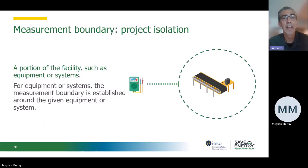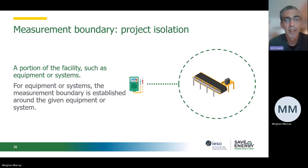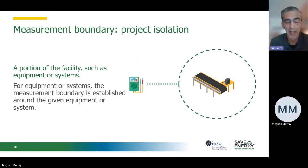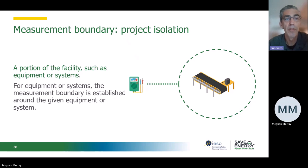Retrofit isolation is the other common measurement boundary, where you draw a boundary around the project itself. For example, those ventilation fans mentioned earlier — the measurement boundary was around the fans, motors, and VFD drives; it was not around the whole building. So that's another common measurement boundary choice.